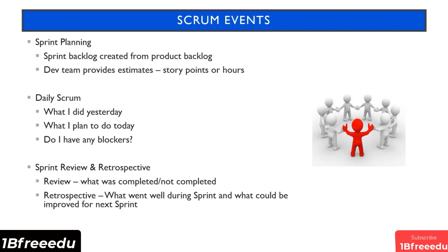So the stand-up Scrum meeting occurs every day of the sprint, and at the end of the sprint, there is a sprint review and retrospective meeting. The review part of the meeting basically entails reviewing the features or stories that were completed or not completed, and working with the product owner on shipping the completed features, if required. The retrospective part of the meeting is to simply reflect on the last sprint and talk about potential to improve the overall process.